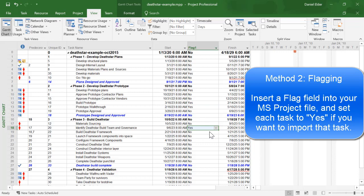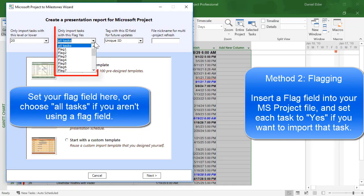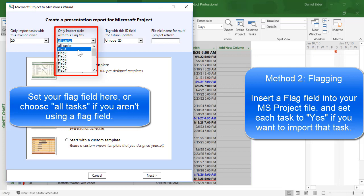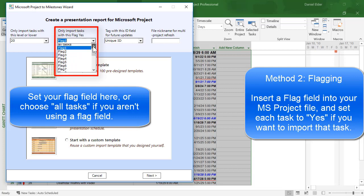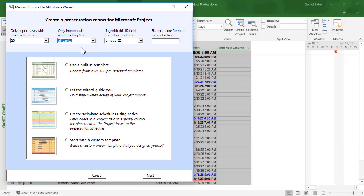And then when you go to the import screen, you'll need to select that flag field from the drop-down menu. Inside the project to Milestones wizard, you should set your flag field to whichever flag you added to the project file. For example, flag1. I will set it back to all tasks since I'm not going to be using a flag field right now.